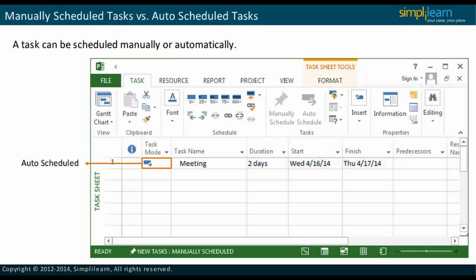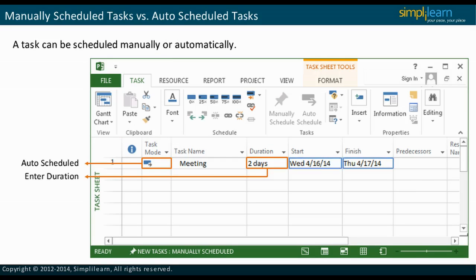In the case of auto-scheduled tasks, you need to enter the duration of the task. The start and finish dates are calculated automatically. The start date of the first task is by default set as the project start date.